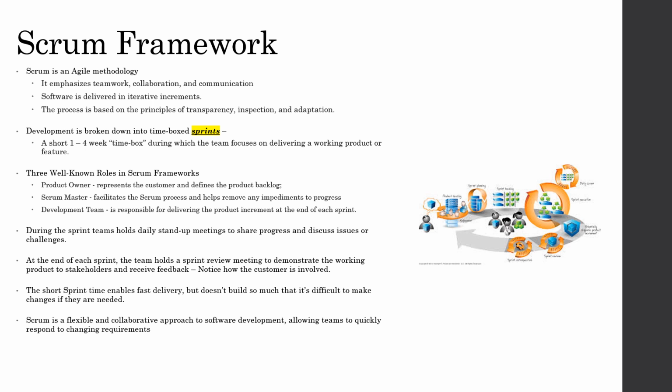Now, during a sprint, you actually hold daily stand-up meetings. And the idea behind a stand-up meeting is we're not going to come into a meeting, sit down, and hang out here for an hour and a half and discuss stuff. A stand-up meeting is supposed to be very quick, 10 minutes or less maybe. And the programmers and the product owner and the Scrum Master get together, and they talk about, what did we do yesterday? Any problems? What's going to happen today? What kinds of progress are we going to make today? And it's very focused and it's very tight.